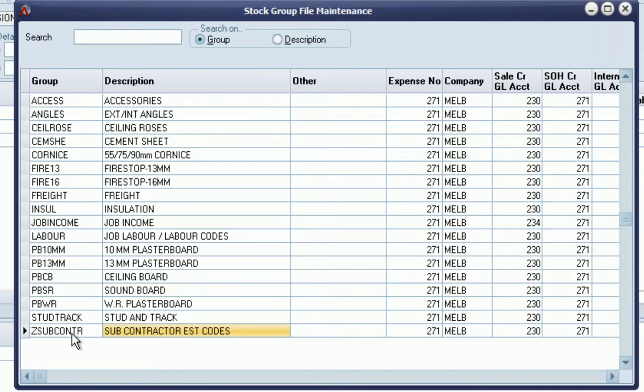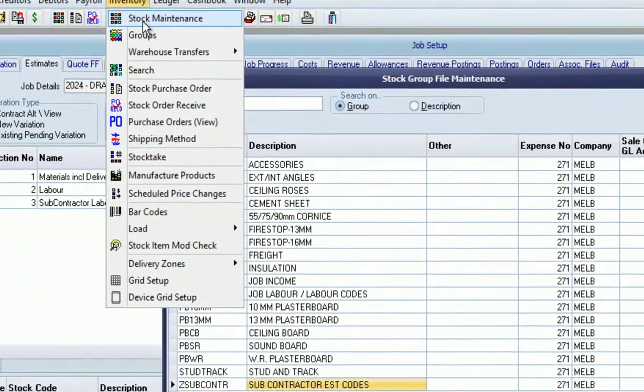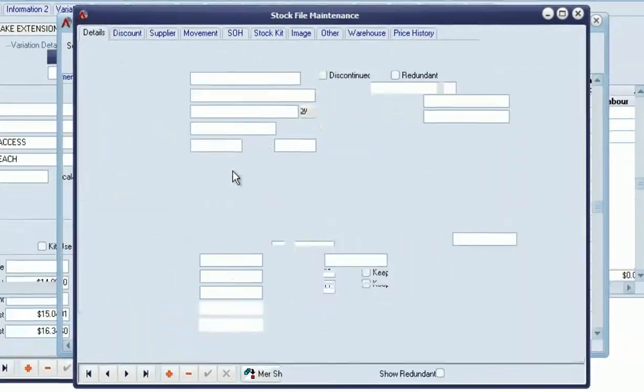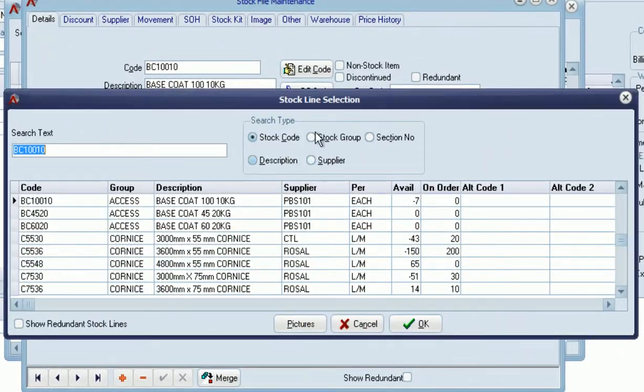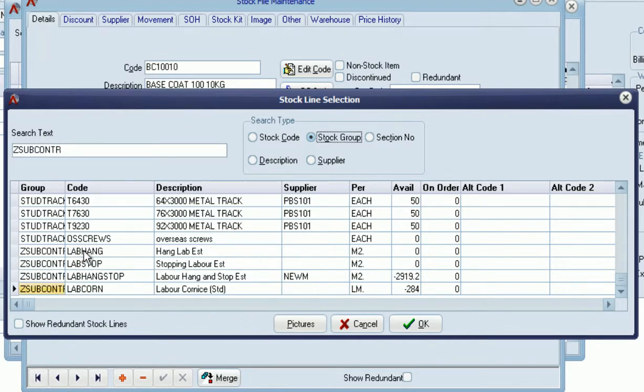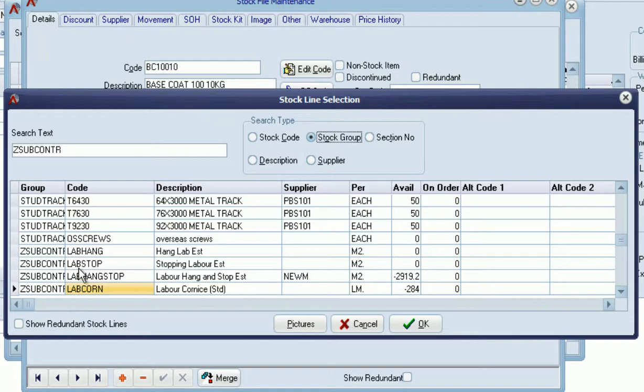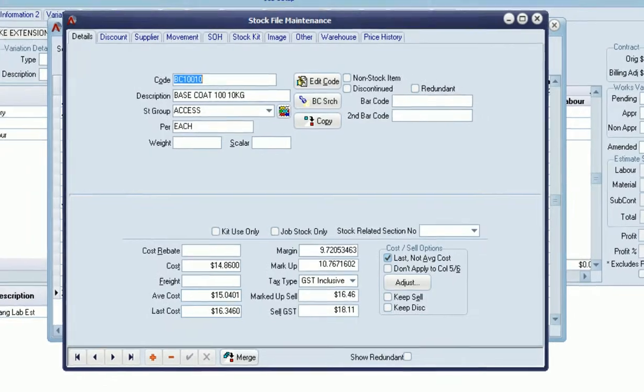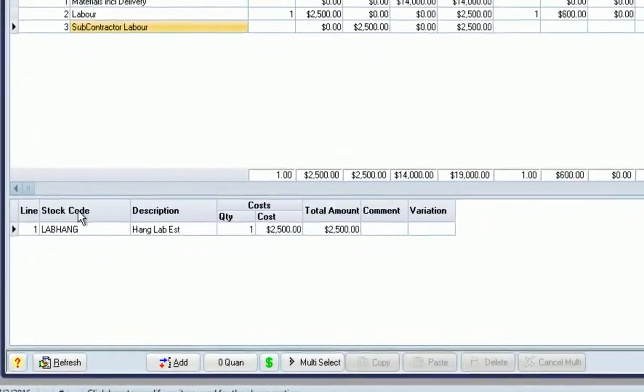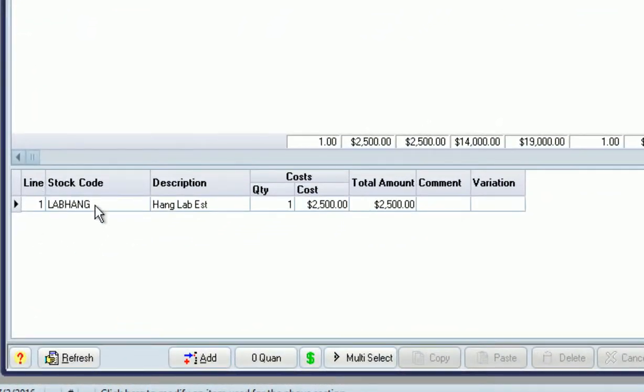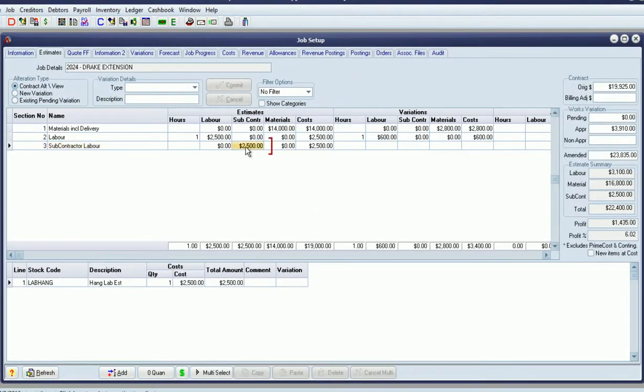If we go back to the stock maintenance screen, we can see we've got just a handful of items defined. If those items are used for estimating, the system will see those estimated costs as subcontractor related. Coming back to our job here, we can see we have one of those codes used on this section, and that's why the $2,500 has ended up in the subcontractor column.